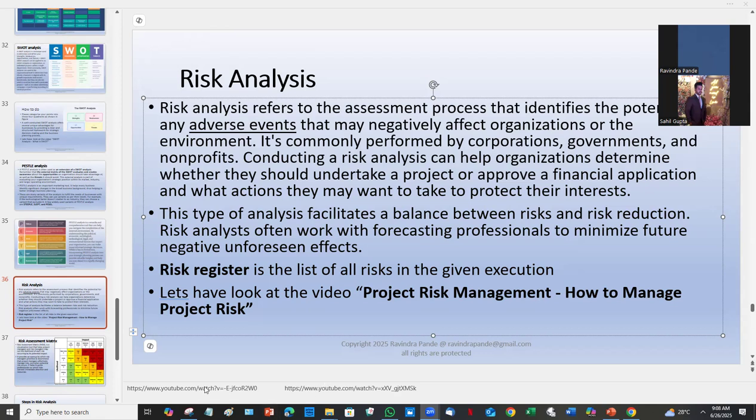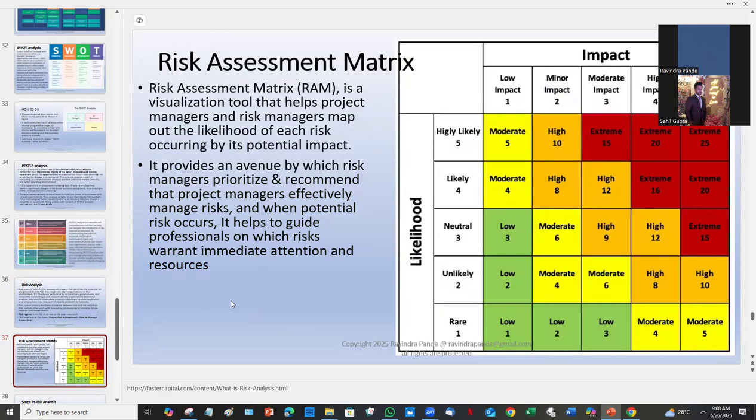Now, how do you calculate this risk? It itself is a science. There are qualitative risk and quantitative risk. Qualitative risk is as we have seen here, a detailed qualitative risk analysis. These are a kind of graphical plotting in terms of a risk assessment matrix. There are a few interviews where they've asked what is RAM in risk management. So you should remember the risk assessment matrix is a table like this. We normally try to categorize risk on likelihood and impact.